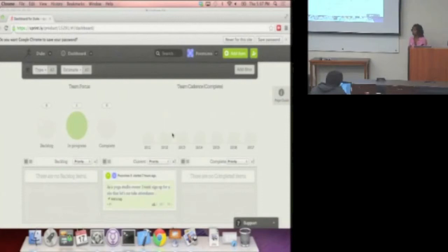Do you change the value of the story at that point in time? You don't need to. You'll still think of it as a 5-point story, a really high one, but it'll start to tell you what your volatility is. By that it means where you estimated and then what you actually delivered. So it gives you a sense of how good you are at estimating the stories and the complexity of each story. Does that make sense? Okay.